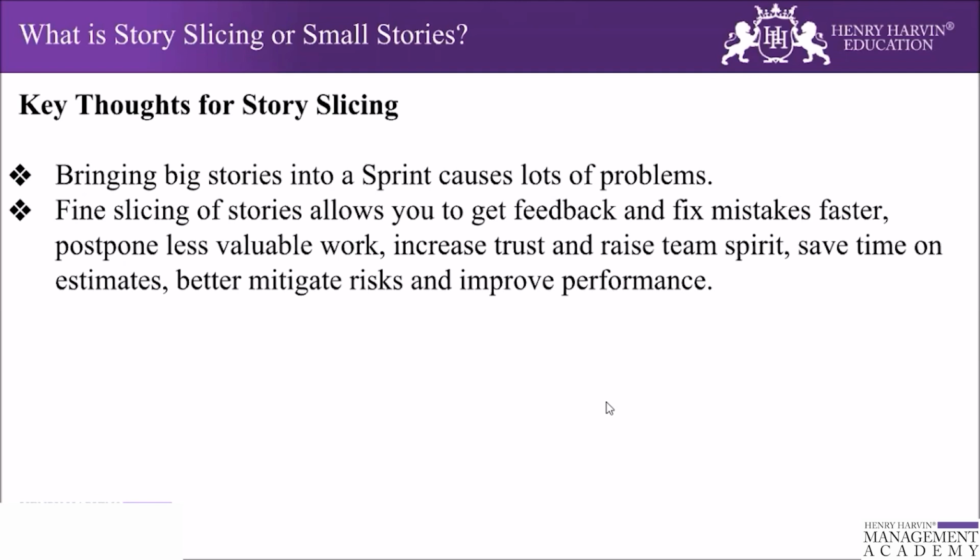And when you still have development to test handoff, or before you start doing maybe acceptance test driven development, or maybe TDD, test driven development, smaller stories enable more frequent handoffs and allow testers to work on a smaller chunk of code. A smaller story also gives you the flexibility to reconfigure and adapt to new discoveries or changes. Perhaps the PO discovers that an existing story is now irrelevant, or while coding you discover a surprise. Small stories make it easier to adapt.